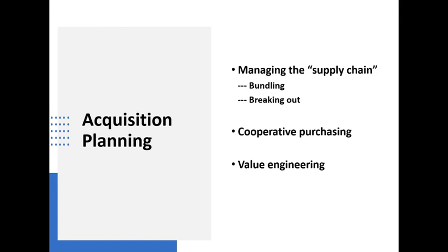So the idea of purchasing something, but also recognizing that there may need to be the ability to obtain spare parts or capability to repair, things of that nature may come into play as well. So buying the cheapest model may be a long-term bad decision if you've got to spend an awful lot of money keeping the asset in working condition and the like.